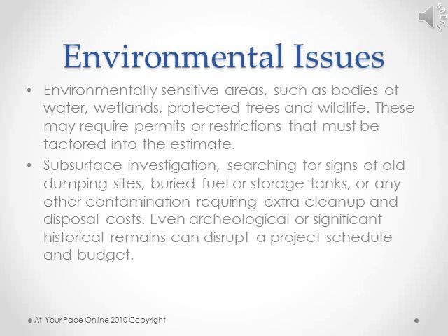Environmental issues can seriously impact the project cost and schedule. A careful environmental assessment must be part of the contractor's site visit. The following are common environmental conditions that a contractor may see and document while visiting a job site: environmentally sensitive areas such as bodies of water, wetlands, protected trees, and wildlife. These may require permits or restrictions that must be factored into the estimate.